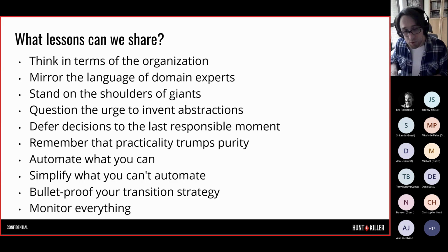Our first microservices deployment, the first deployment where we took a piece of our e-commerce system and broke it off into a microservice and then deployed that microservice to production, actually ended up going seamlessly because we had taken the time to document all of the steps that needed to be done in order to do it, from the littlest piece of detail of put this value in this box, check this button, make sure to check this monitor, things like that.